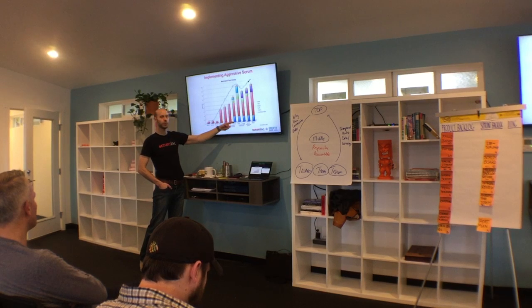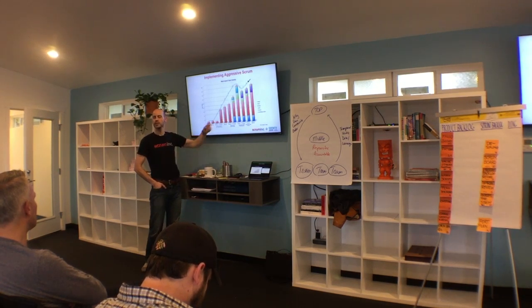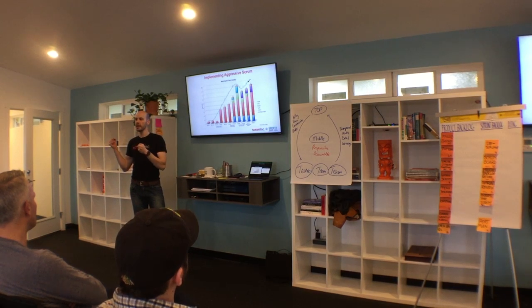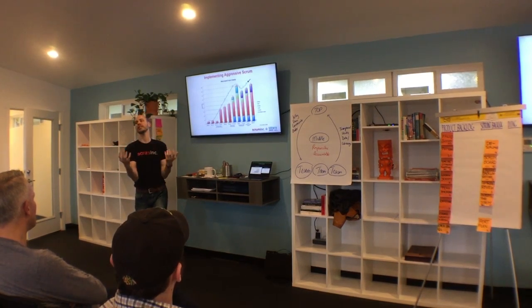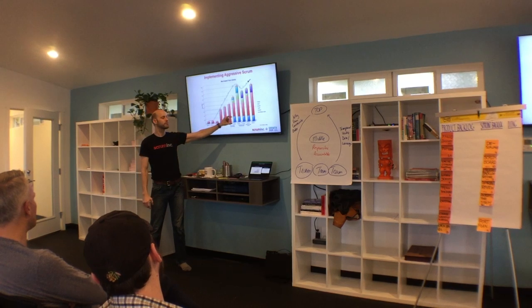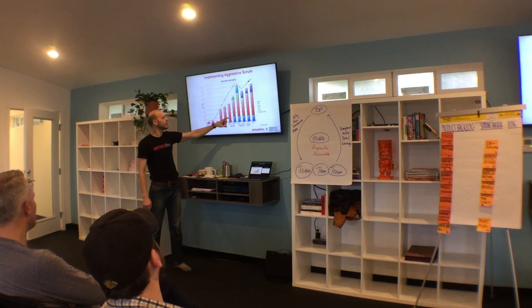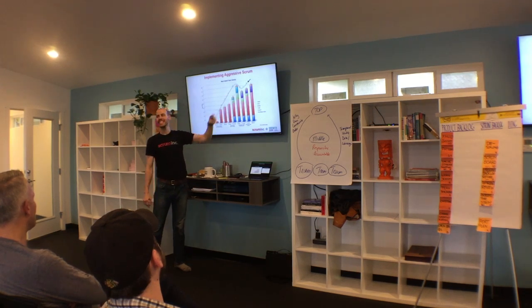Now they completed work in this buffer. This way, when something broke in production, hardware or software, and someone rushed into the team saying, fix this now, they had left points unassigned in the sprint as a buffer to take emergency work in the same sprint. We'll model that pattern after lunch, I think, is when it's trending to be. Velocity then went up to 16x.